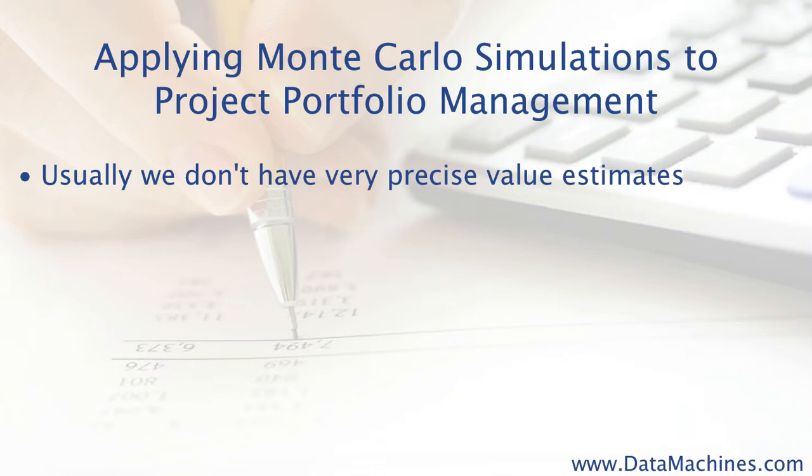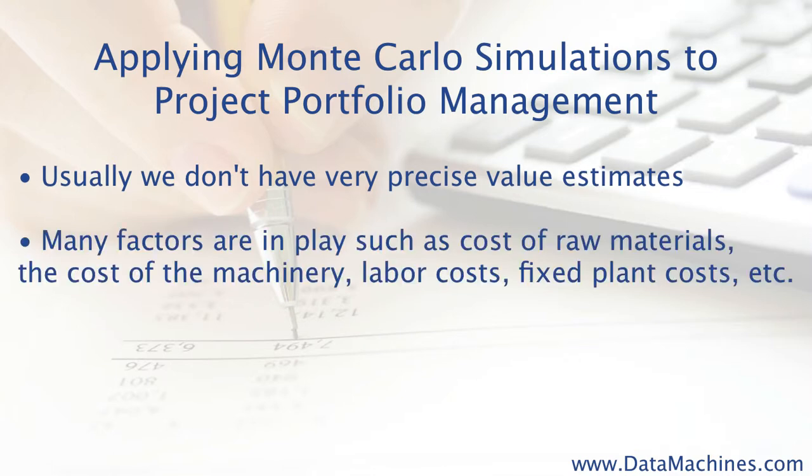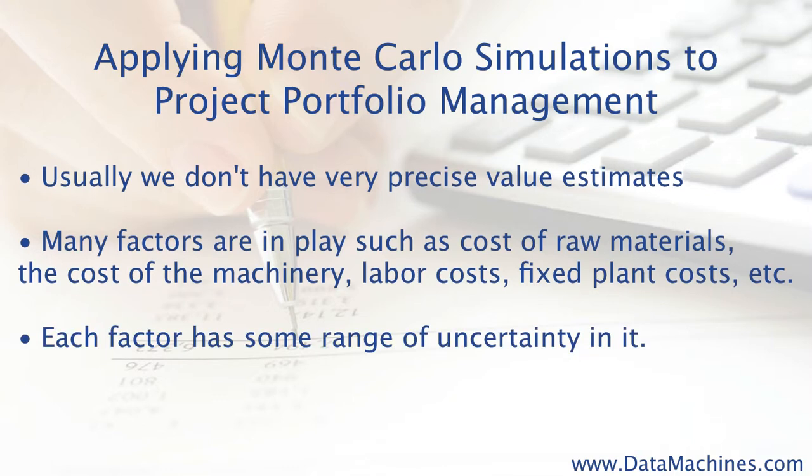For example, if we're trying to determine the cost of manufacturing of a new widget, there are a lot of factors which go into making that cost calculation, such as cost of raw materials, cost of machinery, labor costs, fixed plant costs, and so forth. In each one of these factors, there is a range of uncertainty, and this makes it impossible to come up with an exact value that has any meaning, so in order to better estimate the value for the attributes, you can assign a range of uncertainty for each one, and then metaphorically roll the dice a few thousand times to get a distribution of outcomes for the attributes.